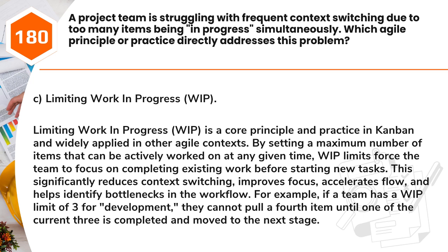This significantly reduces context switching, improves focus, accelerates flow, and helps identify bottlenecks in the workflow. For example, if a team has a WIP limit of 3 for development, they cannot pull a fourth item until one of the current 3 is completed and moved to the next stage.